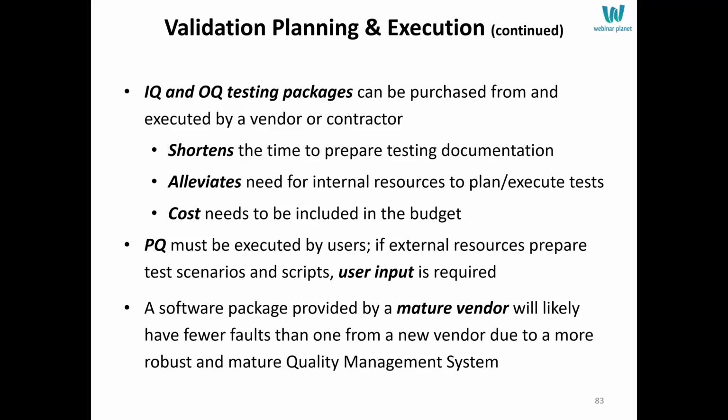And again, if they write the protocol and the summary report, you must be able to do a vendor audit, and you must know the contractor is vetted, is following the practices you need them to do. And then you would have oversight by reviewing the protocol before it is finalized, and then reviewing the final summary report. But absolutely, your subject matter experts, your employees, must execute PQ. No one else can do this.